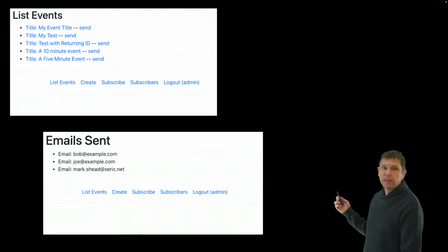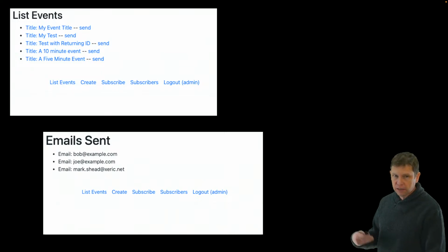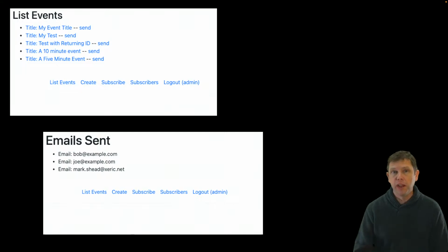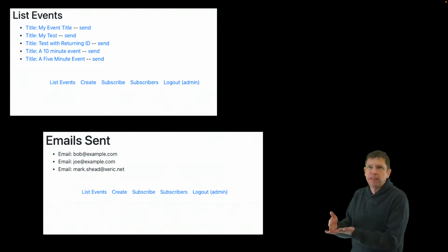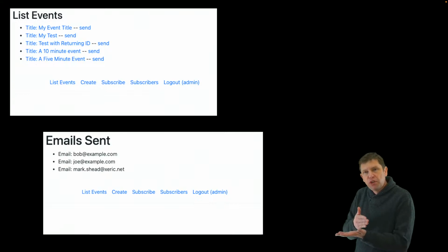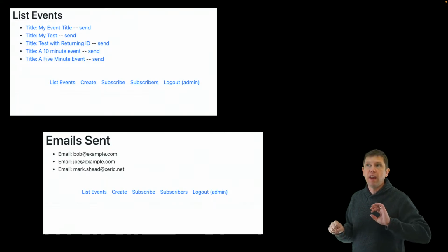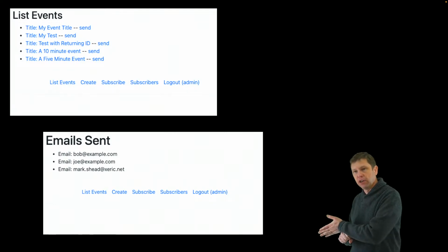One thing it still doesn't do is keep track of who it's sent to. It shows you who it's sent to, but that's not stored in the database. That could very well be the next step we take moving forward. There's lots of things we could do on top of this, but we can do it in the same very iterative way, just taking a basic step, basic step, basic step. And if we do things in very small pieces, it lets us split things up in ways that let us identify things that can be deferred until later.